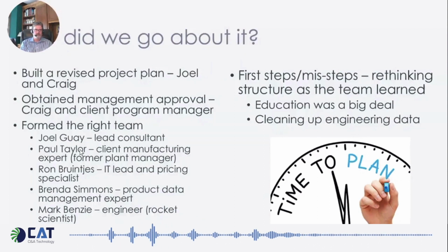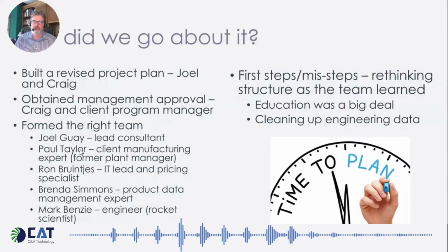Yep. So there was a lot of it. It was somewhat of an organic process, and sometimes I had to come say, Craig, it's going to take an extra month because we've got to redo this. We've learned that the way we were going to do it wasn't going to work. We've got to do it this way. Plus, it'll have this advantage. And I'm like, you sure? And I had to go back to management and say, all right, it's going to be a little longer, but we're going to have this benefit. And so there's a lot of communication.